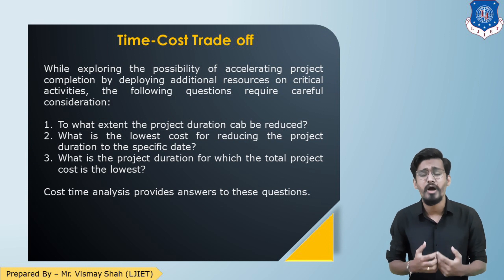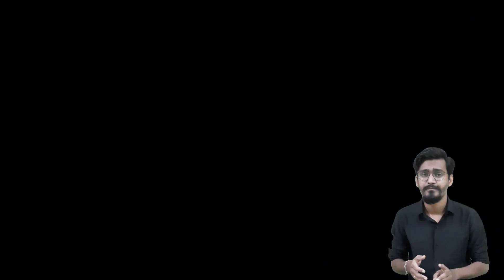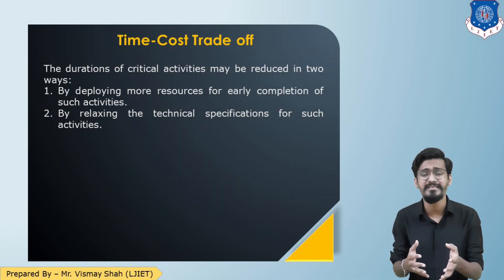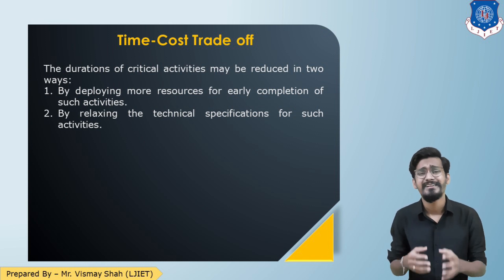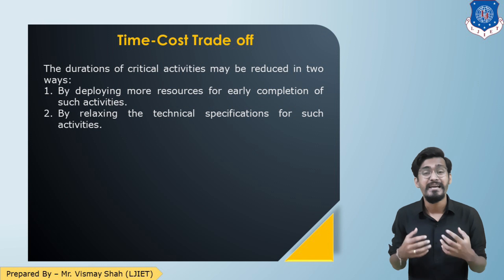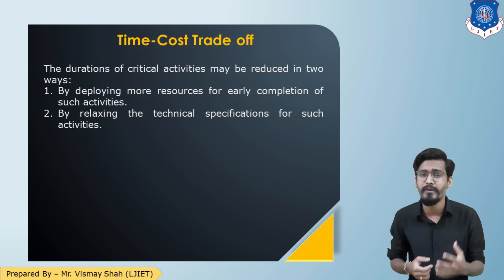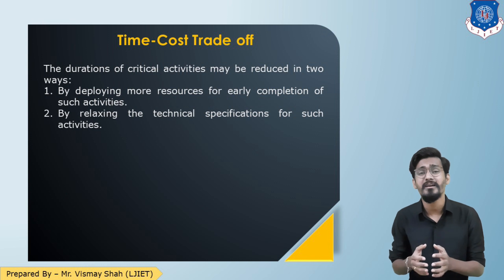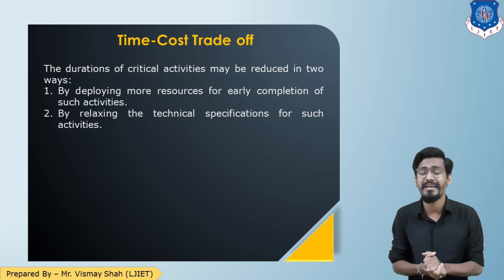When we are talking about reducing the project time, there are two ways. One, deploy extra resources and reduce the time. Second, relax the technical specification of the activity. But relaxation of technical specifications is not in the contractor's hands — the client will not allow playing with the specification. So there is only one way: reducing the time by deploying extra resources, and when you put extra resources there is an increase in cost.